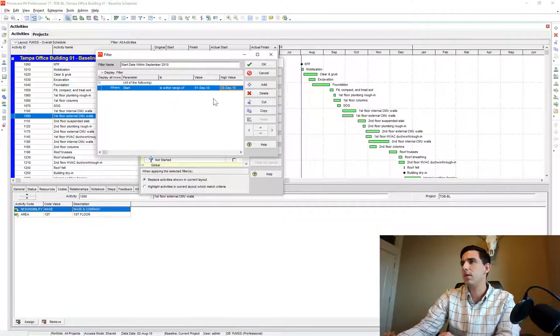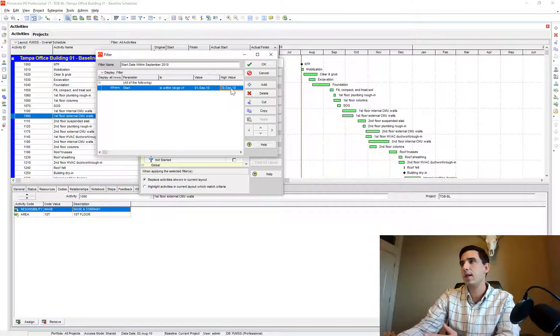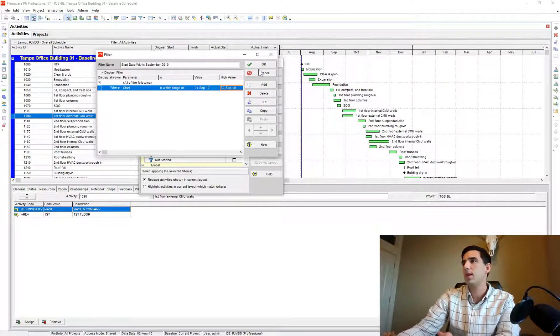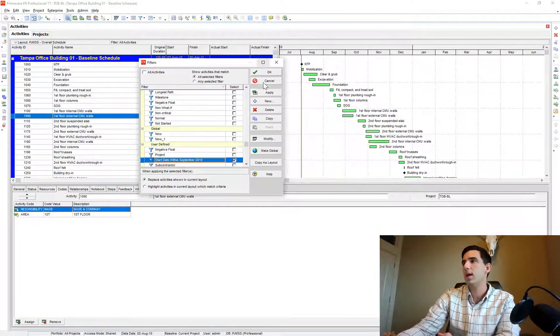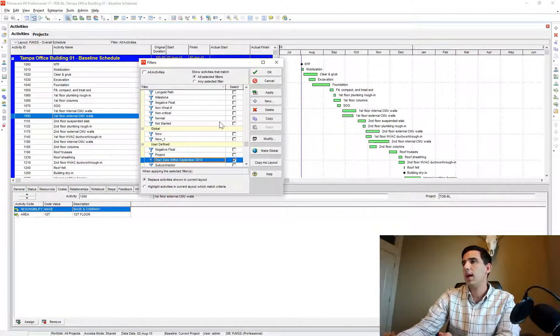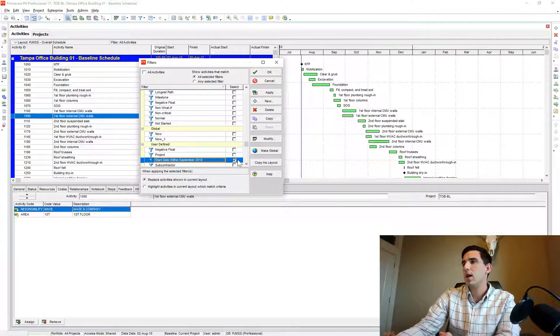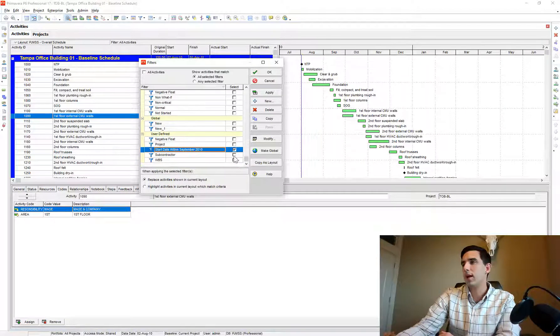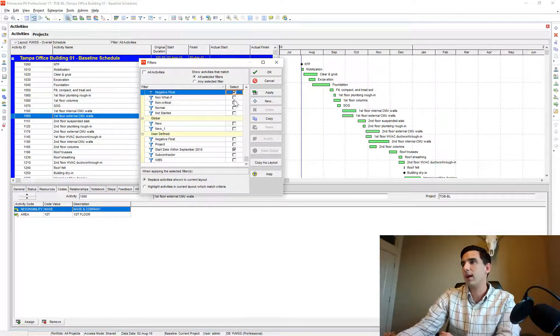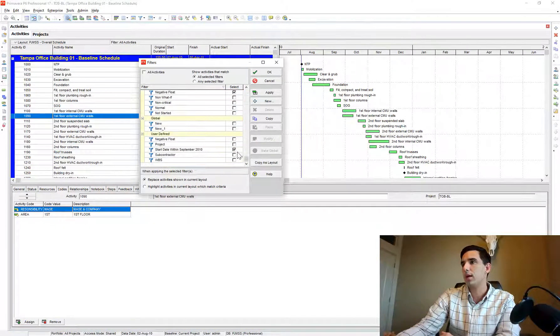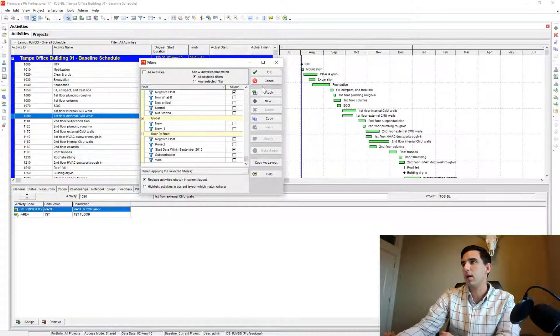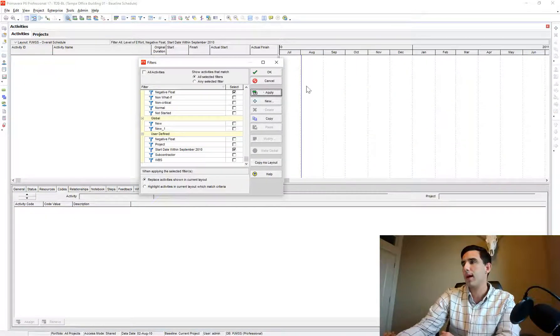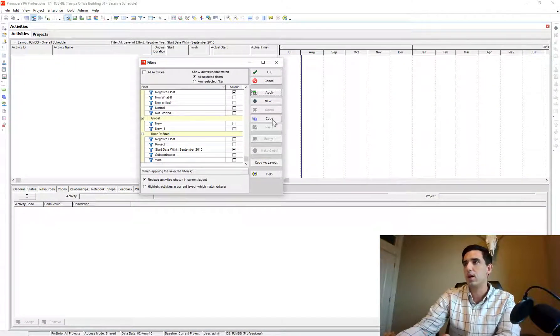So my start date is within range of at the low end September 1st, at the high end September 30th. I always like to make sure that that's the only filter that I'm applying, because you might have multiple other filters going on and you're thinking okay I'm going to apply that and all of a sudden no activities occur.